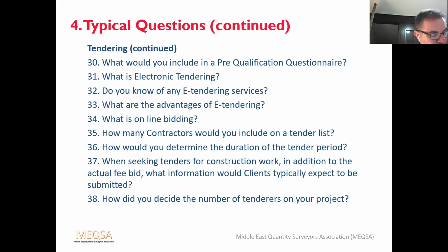But for instance, if it was design and build, there's fewer tenders due to cost and time implications. The contractor would like to think there's a good chance. But for traditional, you would hopefully say 4, 5, 6 maximum as a balance between competition and contractor care. I would recommend you don't say you went to 20 contractors, because then they'll ask you why.